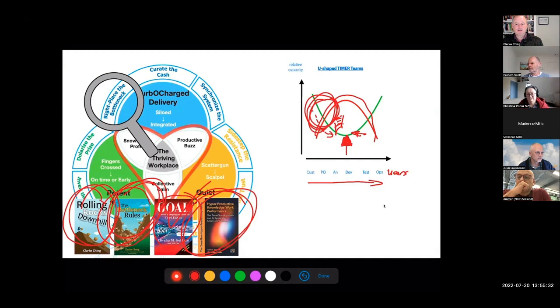So if you just trust me, the bottleneck should be deliberately set up as your developers. And if you are, you'll have very, very fast teams that are heading in the right direction. And if they're not, and most of them aren't, they have far too many developers because people think you get more code written by adding more developers. Then you'll actually have teams which are very, very busy, but they'll be doing rework or busy work. And it's devastating.